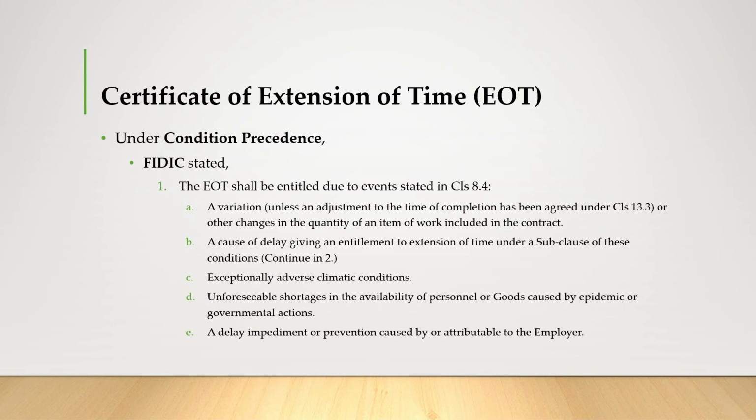And in FIDIC, under the condition precedents, first, the EOT shall be entitled due to events stated in clause 8.4. First, a variation or other changes in quantity of an item of works included in the contract. The second is a cause of delay giving an entitlement to extension of time under a subclause of this condition.